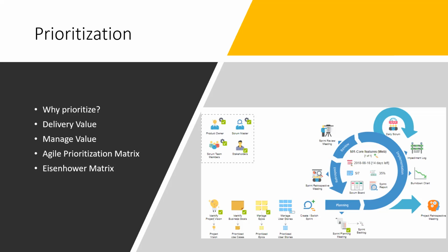Even in these epics, if I take the website to sell movie tickets as an example, the highest priority epics would be around getting the infrastructure done, talking to theaters, getting them onboarded, getting the movies that are playing in the theaters onto my beautiful website. That would be the minimum viable product that needs to go in the first 2 to 3 sprints.